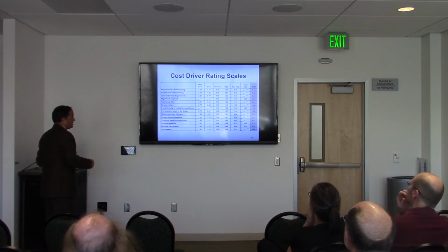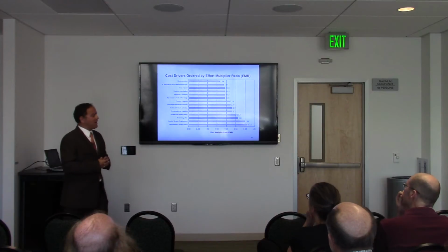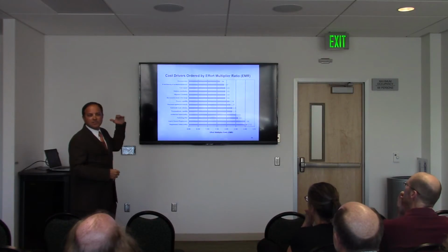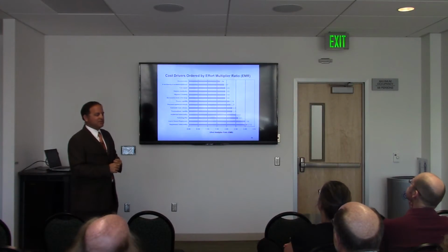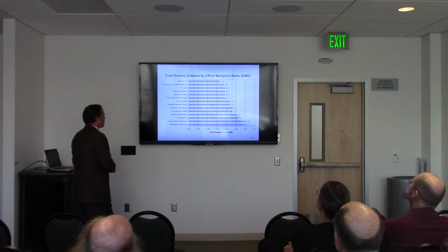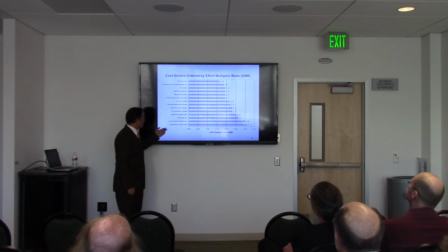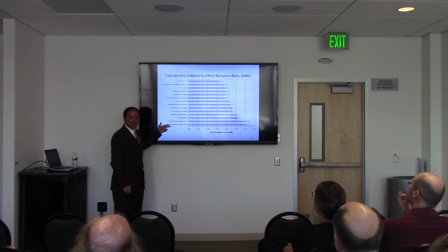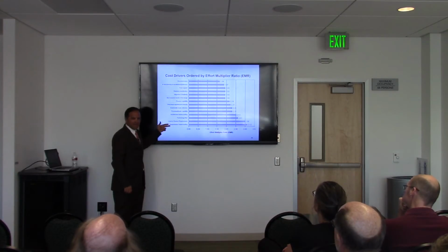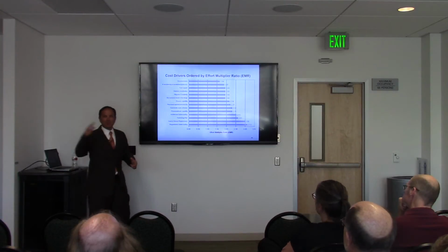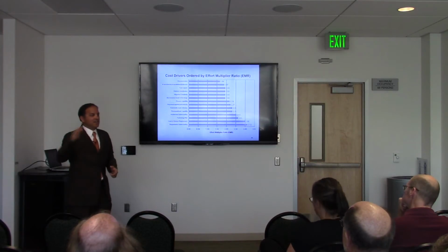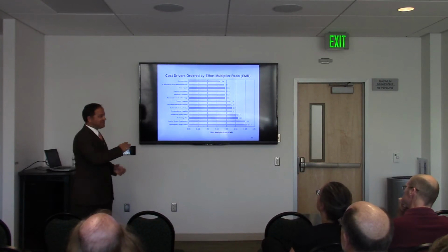And so this Pareto diagram is the EMRs of all of those cost drivers that you saw on the previous slide, but now they're organized by impact. So this was the takeaway. Requirements understanding has the highest EMR value, meaning that this has the biggest swing potential. Best case and worst case, it has the biggest.